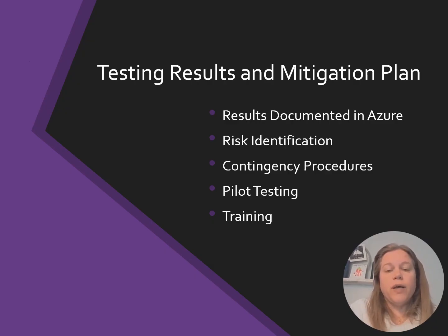In the implementation phase, testing results will be documented in Azure using standardized testing scripts that include date, author identification, and a clear description of the test performed and findings. Screenshots, error logs, and test case outcomes will be attached to each test entry. For failed tests, issues will be documented in a centralized issues log, including details of the failure and responsible parties for resolution. Test scripts and scenarios are required in the testing phase of the PHQ-9 implementation.